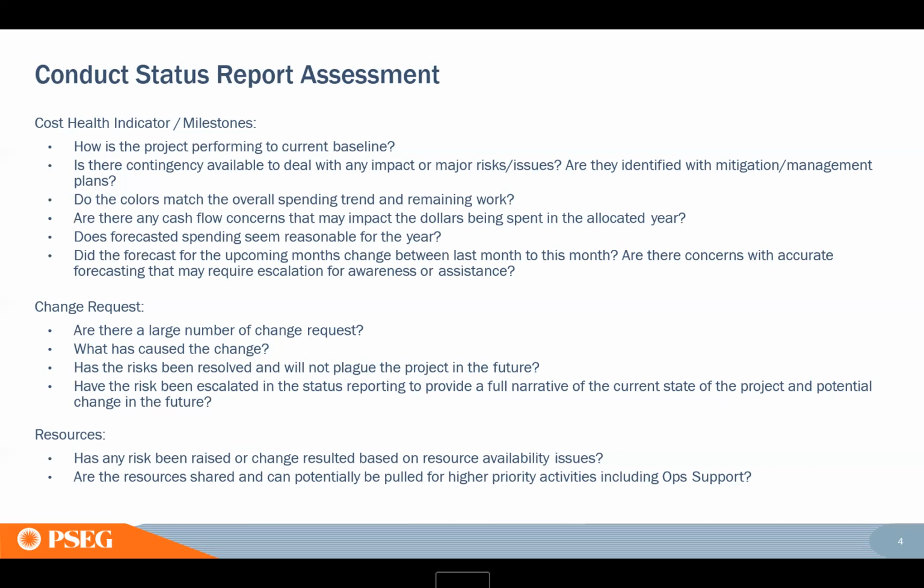You just keep changing the date or you just keep changing the budget based on whether the customer's requesting it or not. It's not really a valid thing to just say, oh, well, the business wanted to. As the PM, it's going to be important that you're taking charge of that situation and that you're clear on how you're going to mitigate it. Or sometimes it is a persistent risk and there's not much you can do about it, but just make sure you're communicating that clearly so you don't get hit by this change request.